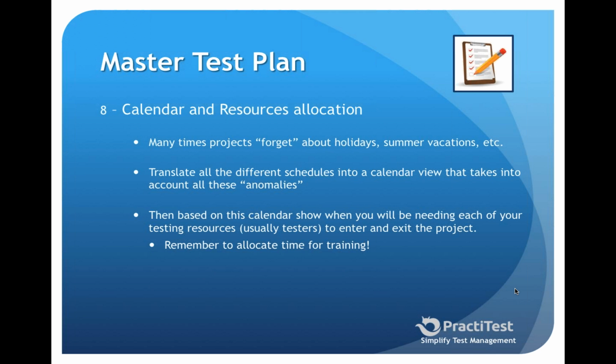And if someone will leave the team, I know that I will need to replace him or her. Allocate time for training. Make sure that, again, you translate everything to a calendar, because regular days do not translate to calendar days very well. Okay, and again, remember, guys, you're testing. You're always the last phase before release. You're always going to be delaying the release, so you want to make sure to have these numbers very, very straight.